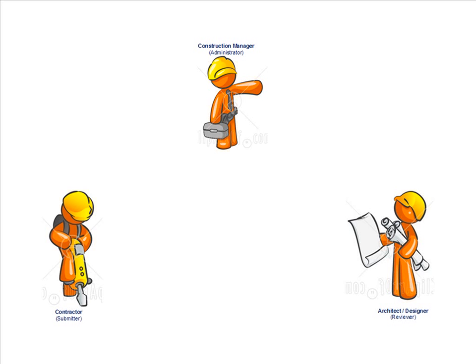The contractor receives a list of items that they have to submit from the construction manager and then has to prepare the documents and send them into the construction manager for review. Finally, the architect and the designer is responsible for reviewing the content of every item submitted so they can make sure that it meets the contract's specifications for the project.